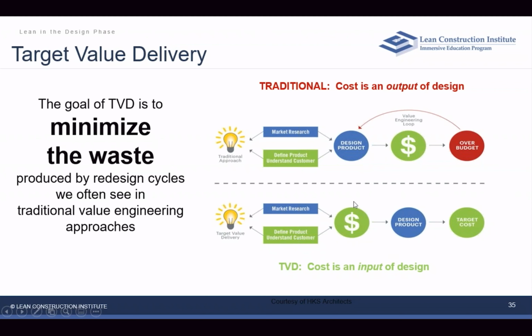But with this, we're almost doing continuous estimating, or smaller batching of the estimating, instead of one large batching cycle of estimating. So we're using that operational concept we were just talking about regarding smaller batches. That's a great way to apply this to the design side. Again, this is going to involve teaming of cross teams, those who are doing the construction work and those who are designing the construction work.